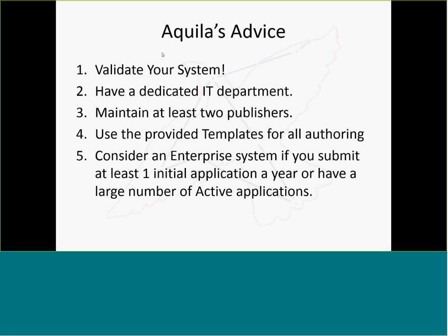A full 505(b)(1), something 500,000 pages long with multiple phase 3 studies, a full non-clinical section, and some novel chemistry, would take 2,000 to 3,000 hours to publish. Just take the authored documents, get your submission-ready application.